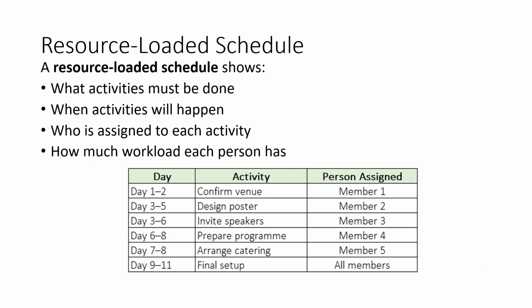This type of schedule helps the project manager check whether any person is overloaded or whether any task has no assigned owner. A resource-loaded schedule is more practical than a normal timeline because it connects time planning with resource planning.